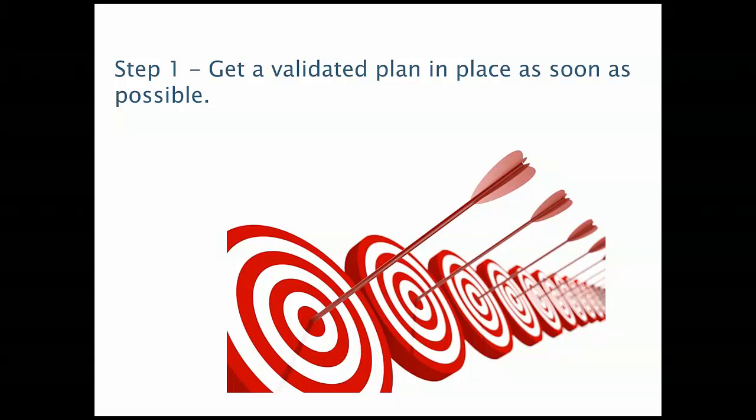The beginning of the project is the most important part of the project for 3 different reasons. Number one, the beginning of the project is when most issues occur. Your design issues during the submittal process, your subsurface conditions during your initial breakup of earthwork. Usually during that period is when most issues surface.